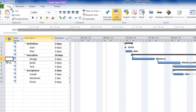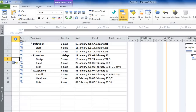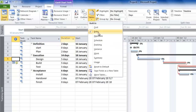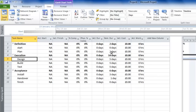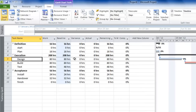Going back to the Task tab, go and select the Tracking Gantt. This is similar to the normal Gantt, except it has two bars for each task. The lower bar is a grey baseline, which means this is what we originally agreed. There are also other tables you can use — for example, the Tracking Table, which shows you information on actual duration, remaining duration, actual cost, actual work, and so on. We could also use the Work Table as an entry screen for monitoring and tracking progress.